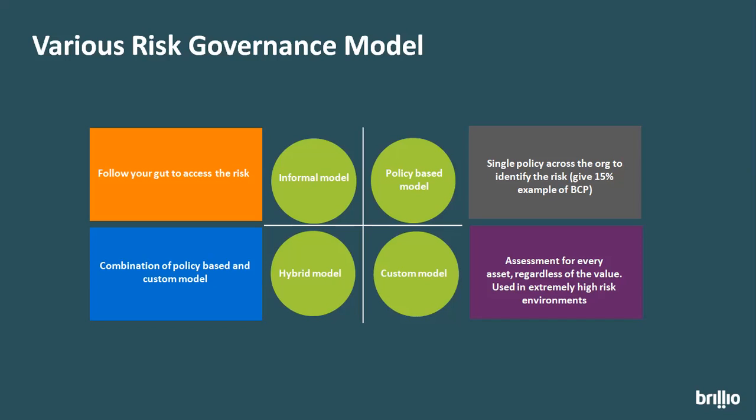But when we look at the custom-based model, it can depend upon project to project. Some projects might not be as critical as others. The projects which are not at all critical can have 0% BCP seats. The projects which are very critical can have 25% or more. Let's take the example of ATC, air traffic control. If there are 20 people in air traffic control, and if the infrastructure is down, we cannot let the planes hang high in the sky.